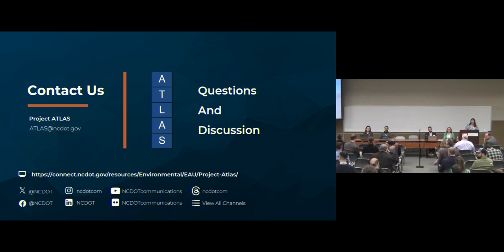If someone were to say there was an addendum to a document or an agreement and we upload that manually, or someone removes it accidentally, is Atlas looking for that file and naming convention to still be there? So if I delete a document or an agreement, since it was originally uploaded through Atlas, is that check still there? Or if it's no longer there, is it going to have an X saying, hey, this deliverable is now missing? If you loaded it through Atlas and then you went into SharePoint and deleted it, then it's going to be looking for it. You're right.